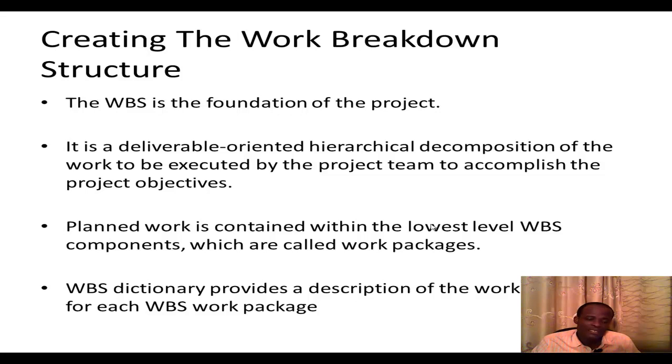Now, after creating a project scope statement, the next step is to create what we call the WBS, or the work breakdown structure. It is the foundation of the project, because from the WBS you're going to get all the activities that make up the project, and all your time estimates and cost estimates and the budget and everything will be based on the WBS. That's how come we say it's the foundation of the project.